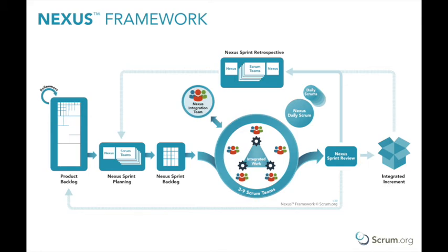Definition of done. The Nexus integration team is responsible for a definition of done that can be applied to the integrated increment developed each sprint. All Scrum teams of a Nexus adhere to this definition of done. The increment is done only when integrated, usable, and potentially releasable by the product owner.